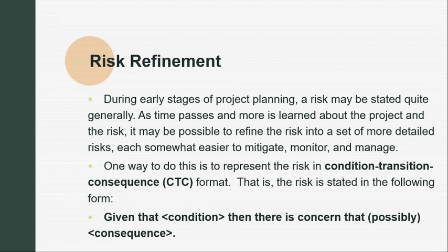So risk refinement is actually done during the early stage of project planning. Risks may be stated quite generally during the early stage of project planning. As time passes and more is learned about the project and the risk, it may be possible to refine the risk into a set of more detailed risks. These were already identified during project planning, isn't it?